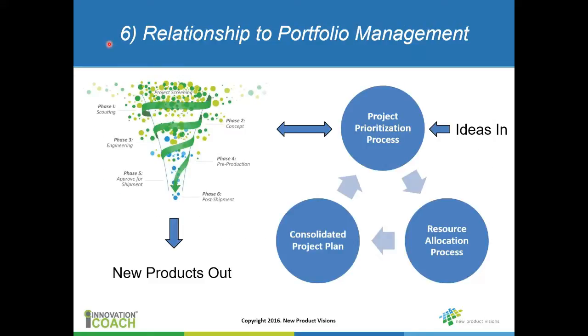And finally, before we go through the process, there's a relationship between PhaseGate and portfolio management. The next webinar will focus on portfolio management, which is really the process that you go through to look at your current projects in light of other opportunities that might come about, and decide how are you deciding which projects you're going to work on? And out of that process flows the projects that go into PhaseGate and actually get developed.